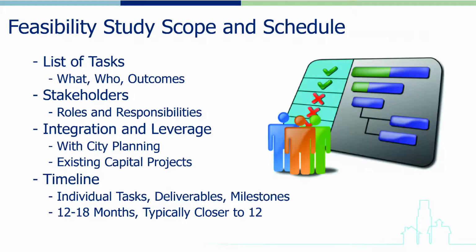To the extent possible, it is useful to include a very preliminary scope of work and schedule for a technical feasibility study on the proposed microgrid in the development plan. This could be helpful in soliciting bids for this work from interested third parties and would likely be required by any funding agency providing feasibility study funding assistance.